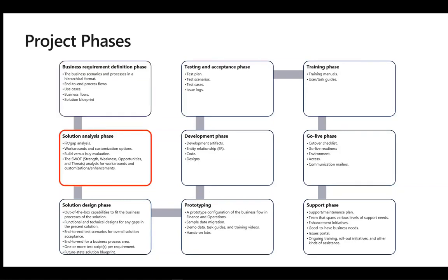Solution analysis phase. In the analysis phase of the project, the implementation team should address the following milestones: fit gap analysis, workaround and customization options, build versus buy evaluation, the SWOT (strengths, weaknesses, opportunities, and threats) analysis for workaround and customization enhancement.